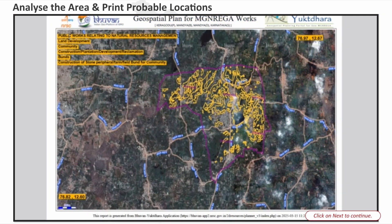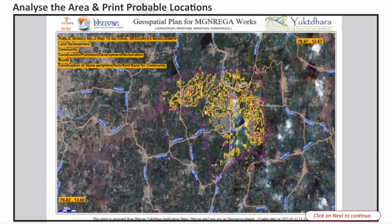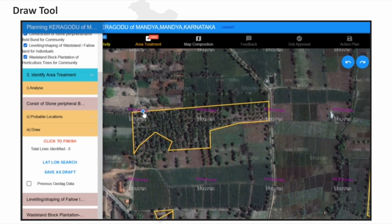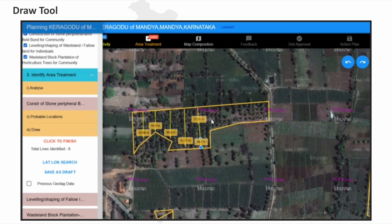The generated maps are presented to the Gram Sabha for approval of both GAW and non-GAW plans. Only after the GP resolution is uploaded can the user draw the approved GAW activities on the map.